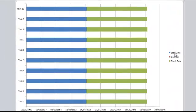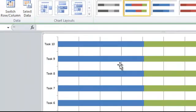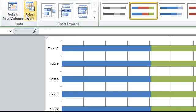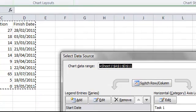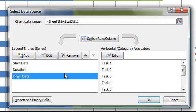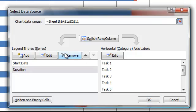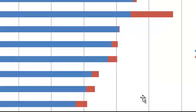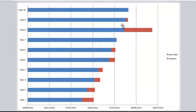At the moment I'm showing start date and finish date. Duration isn't currently showing, but if I go up to Select Data, the next job is to delete the finish date column. Then I can start to see my duration. The duration series is actually the graphic I'm going to be using to represent my tasks.